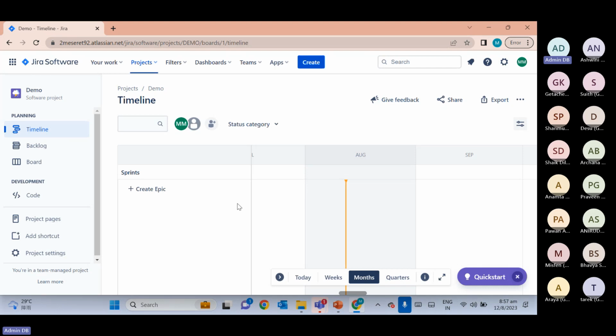And then within that sprint, as a developer, you will get some tasks. Okay. And you need to deliver that task. If you are unable to deliver due to any reason, like you have some dependency or some system is not ready, and you are not able to connect and complete, then that task will move to the backlog. Okay. And then you need to do that task in the next sprint.